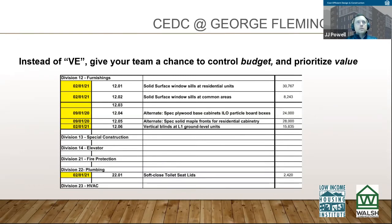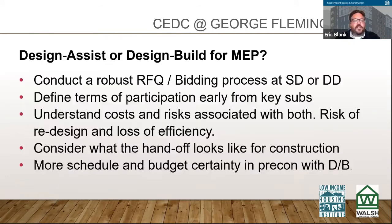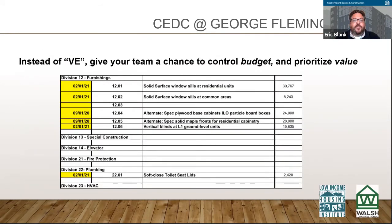That's a great feeling as a general contractor, to be able to do that, not have to cut out those aspects of the job because we have to get under the budgetary wire. Can I also say, from an owner's perspective, it's super useful to have these alternates priced at the beginning, so that these were bid with the project. And then we basically had these prices pretty much locked in.